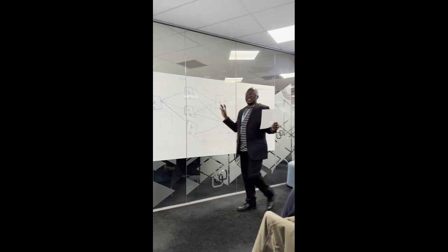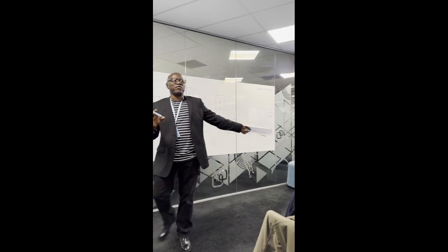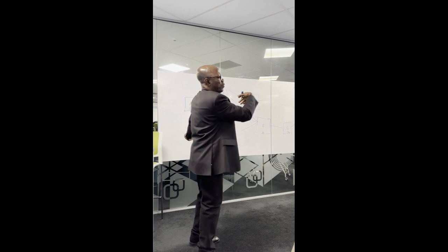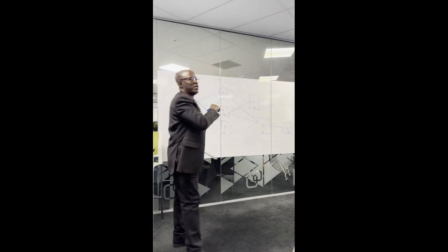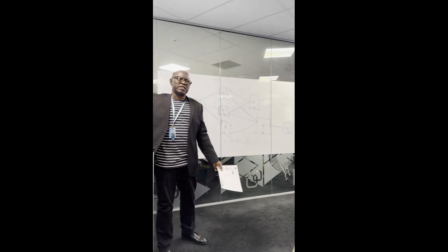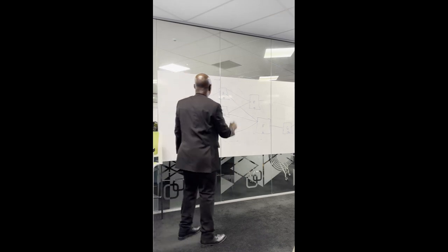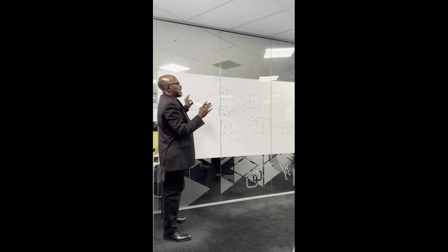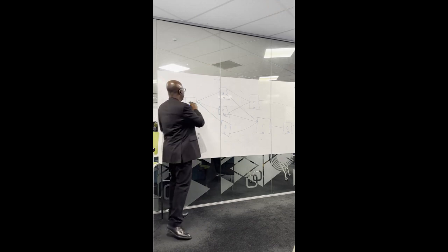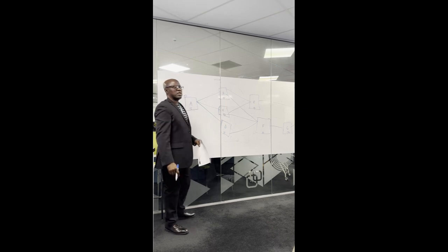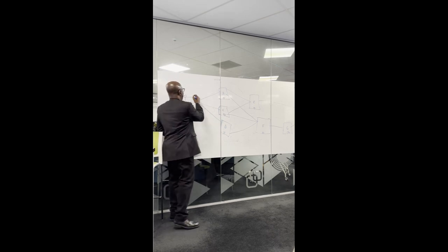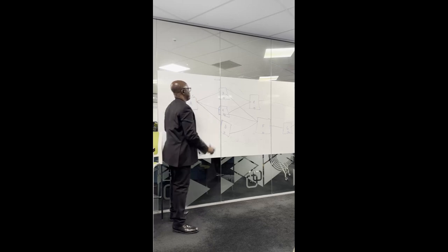So we've created a sketch representation of all these activities now. So remember, when we are moving forward, we plus. When we are moving backward, we minus. I've told you to read. The formula is there. So we're going forward now. Because this has no predecessor, we assume that we're taking off from 0. How many days with this activity completed? 5 days. We have our 5 days here, 0 plus 5.